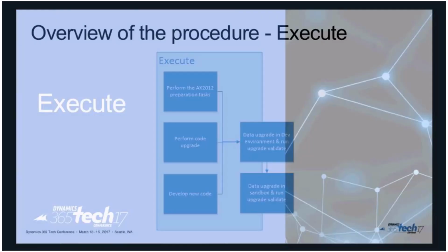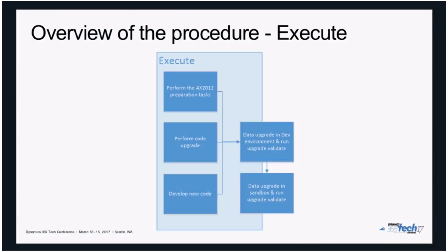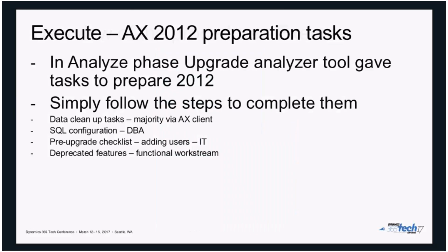Now, when you're ready to execute, you perform the actual code upgrade within your LCS environment. You deploy your development environment and do all the steps to ensure that you have resolved all the errors, and run your data upgrade in Sandbox, and run upgrade validation within your Sandbox as well.